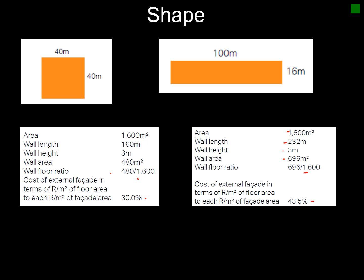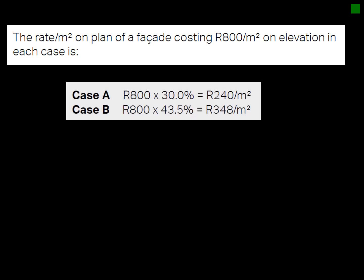You can see the ratio is higher. Looking at it in practical terms: a facade costing 800 rand per square meter on elevation, with a cost ratio of 30%, works out as follows. 800 rand per square meter times 30% gives you 240 rand per square meter just for your external envelope or walls.